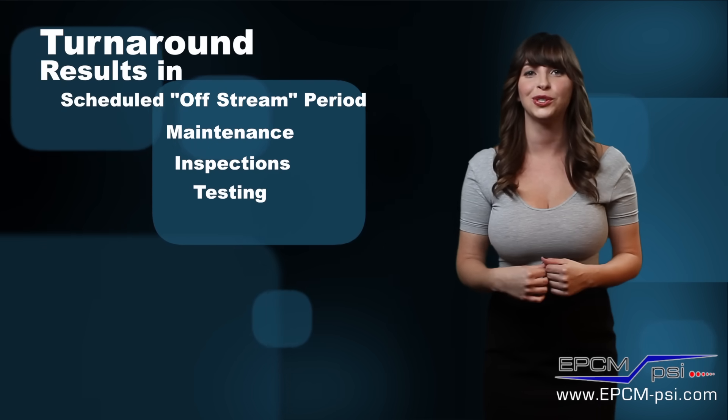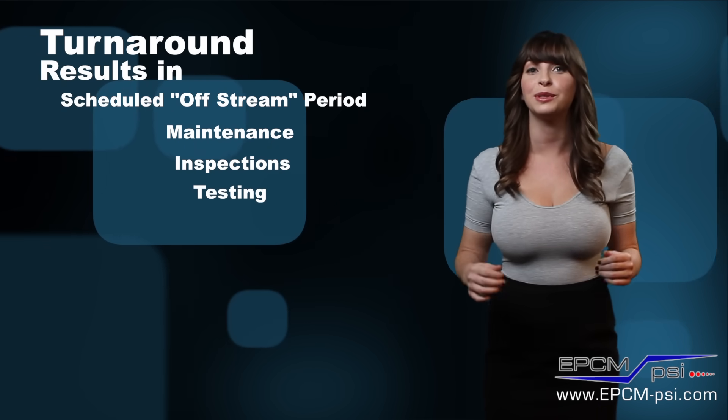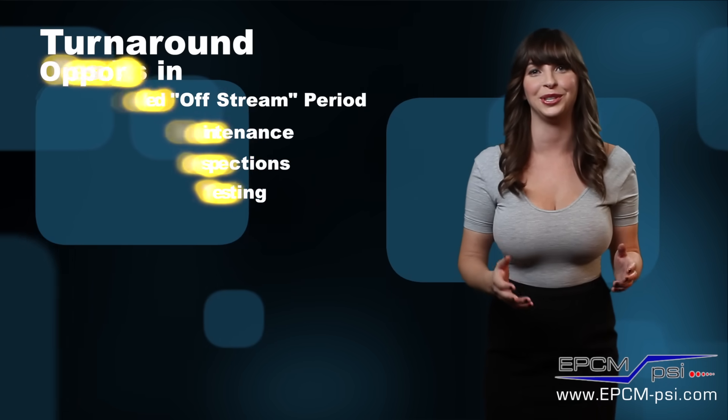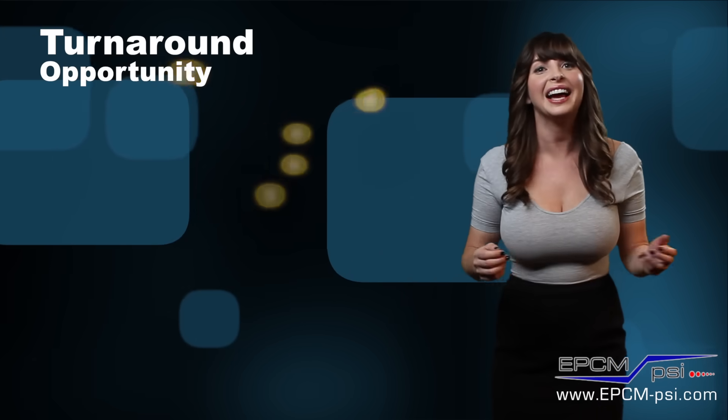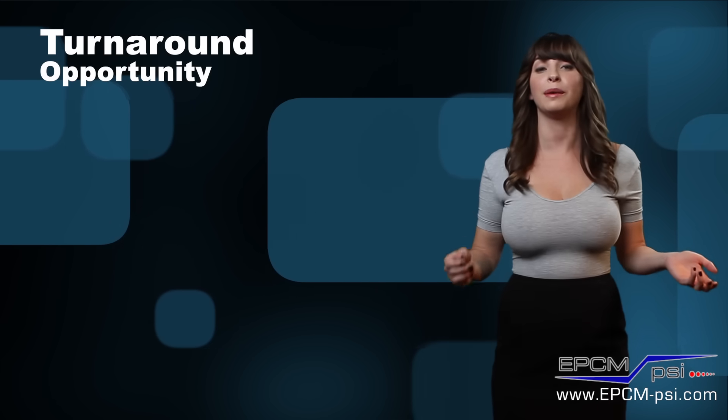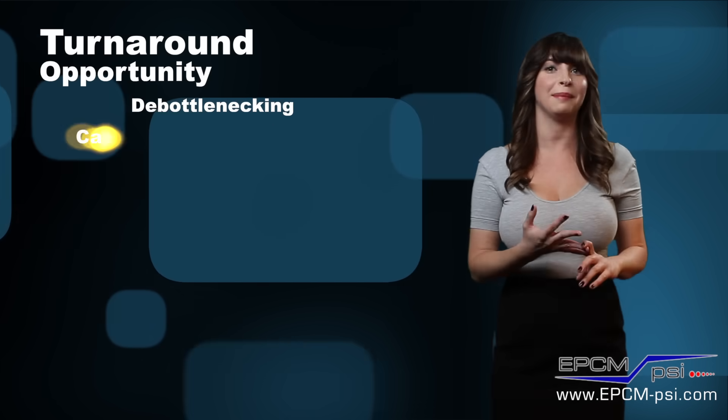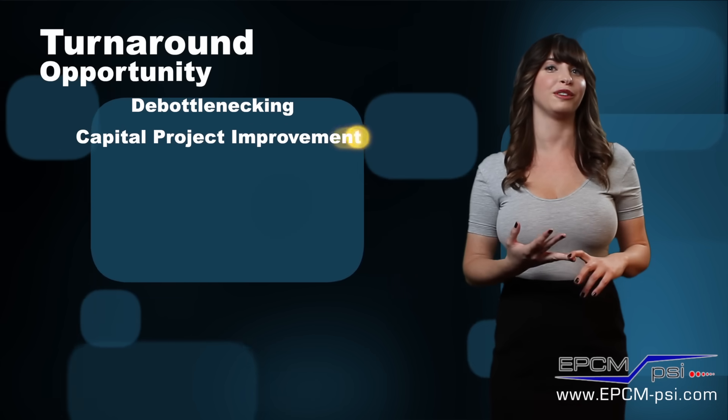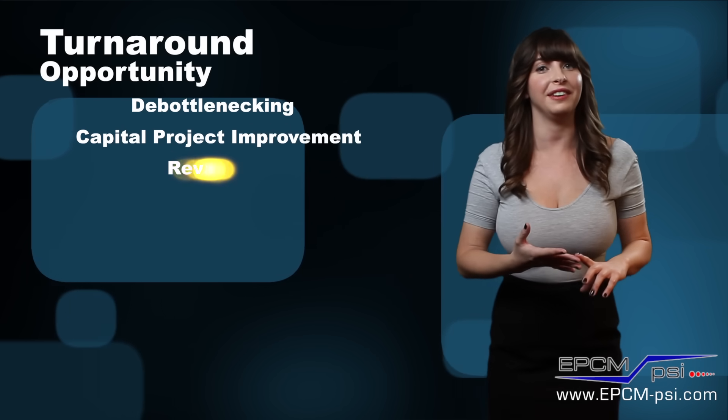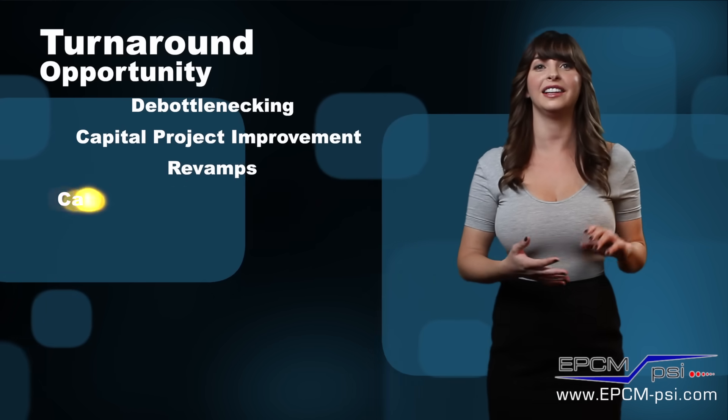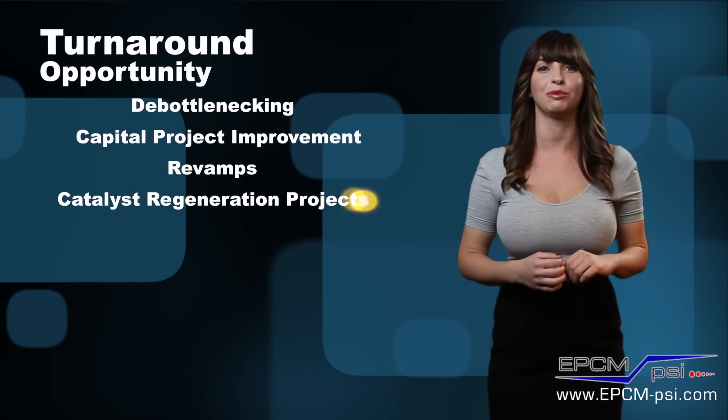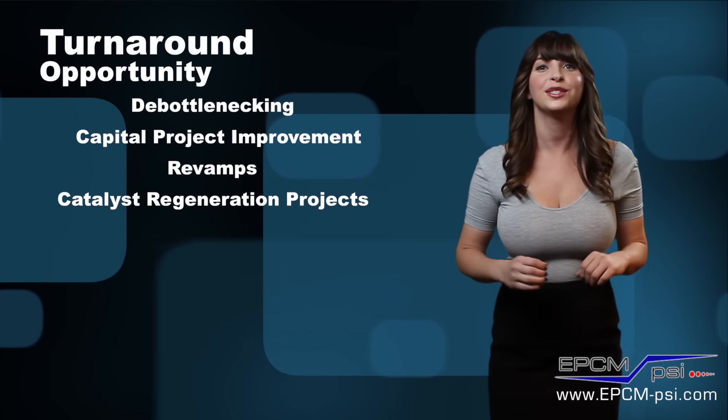Once the plant is off-stream, the downtime presents an opportunity that can be used to perform de-bottlenecking, capital project improvements, revamps, and catalyst regeneration projects.